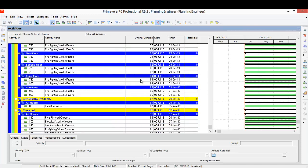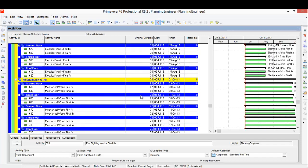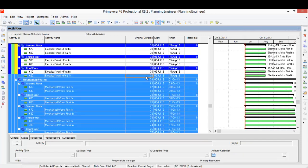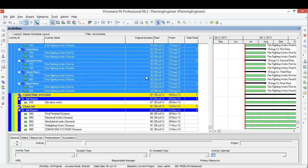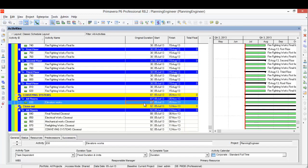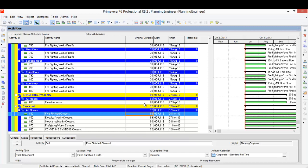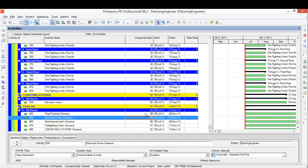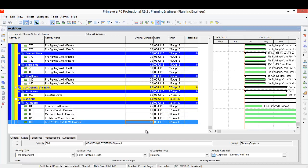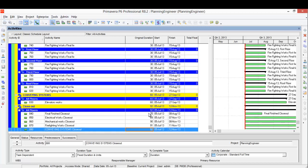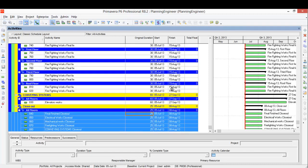I'll use the same for mechanical and firefighting, let's make all of them one month. Elevator work could take two months, and the closeout, let's give it 25 days. This is a very rough estimate about the duration for each activity.